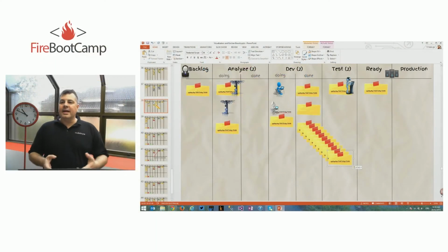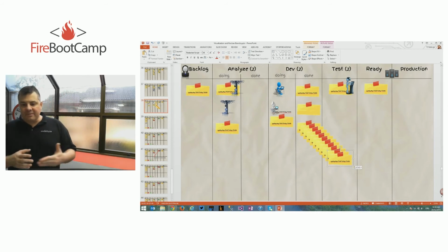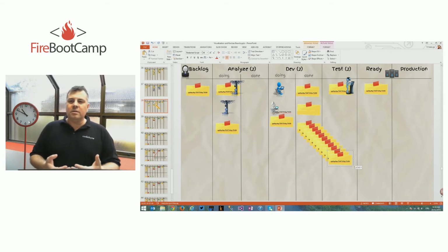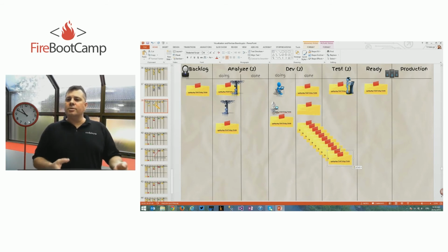You have a bottleneck again. You cannot test this going forward. The whole idea is not to say, hey, use a WIP limit of 2. You have to come up with a limit that works for your team, and this will take a couple iterations, because you're going to find out what people are capable of, what the formation of your team is, and how you can work well together. You're going to come up with limits, in this case, that work for you.